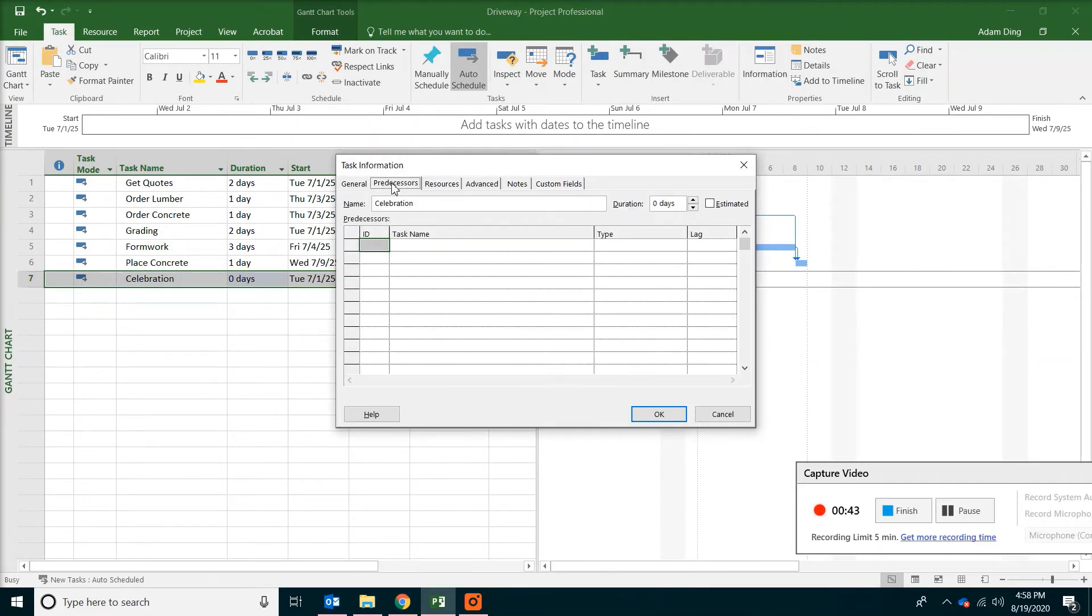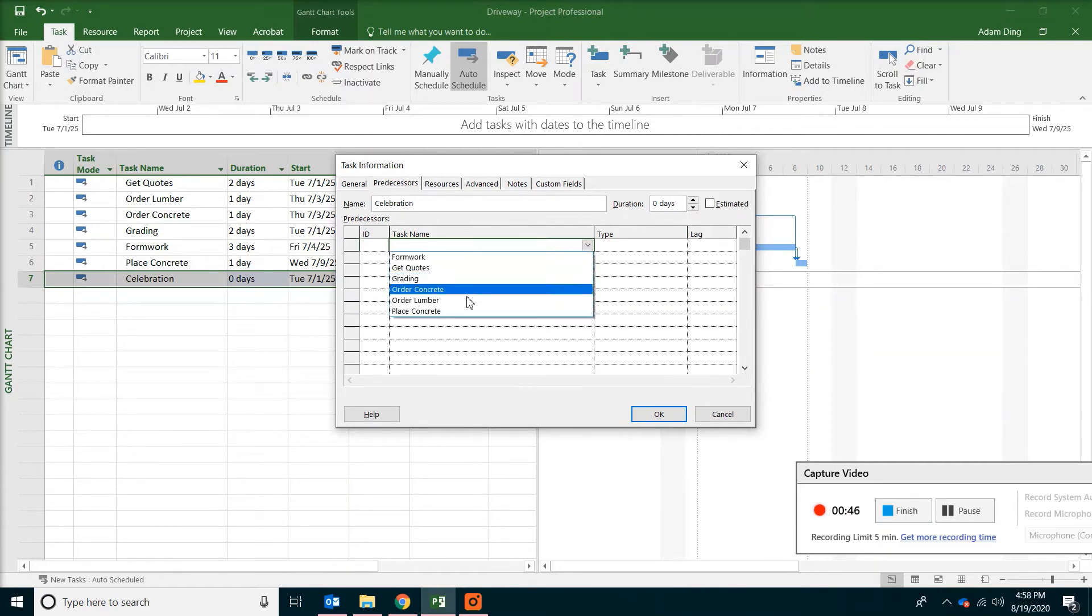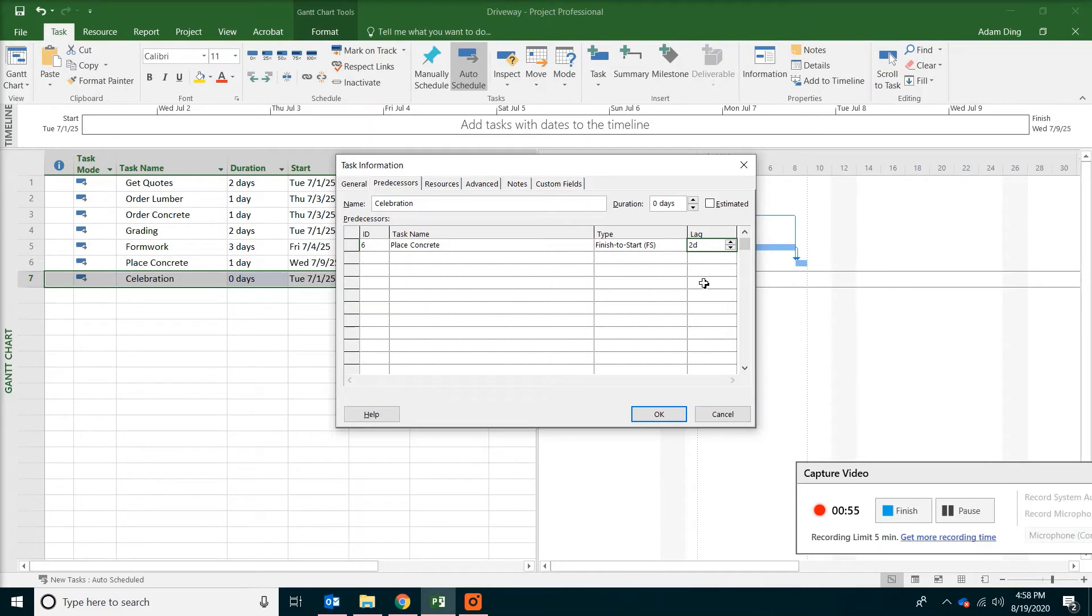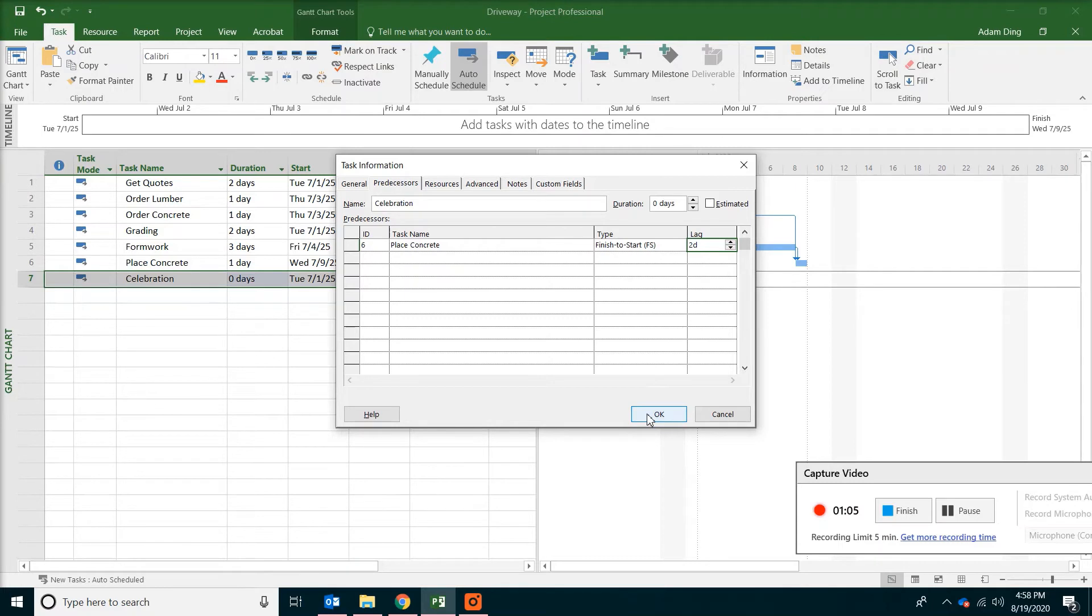Switch to predecessor tab. And then pick concrete placement. Type two for the lag. Which means you will need to have two days after the concrete has been placed. Because you will need that two days at least for the curing and the finish. So click OK.